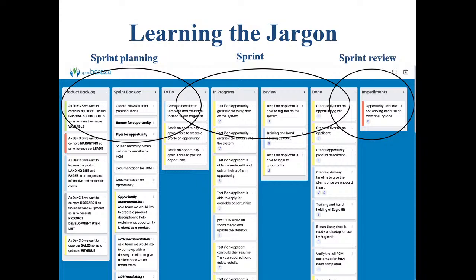Now, you'd find within a sprint, the stories keep moving from the to-do box to the done box. And by the end of the sprint, you should be able to demo which user stories on the sprint backlog were completed and can be moved to done. If there are impediments for why some stories can't be moved, they are moved to impediment.